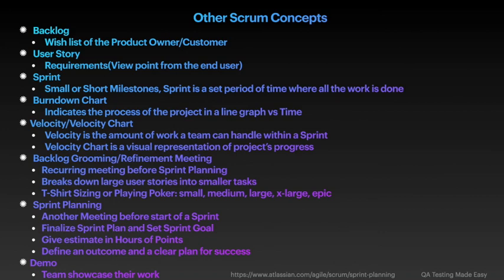The entire team should be in the meeting, including product owner and Scrum Master. Scrum Master is kind of the moderator or organizer of the meeting. The product owner sets priorities from the backlog for the sprint. It is a good idea to groom the backlog items for few sprints, but sometimes for time constraints, that's not possible. Developers, architects, QAs can ask questions if they need any clarification. Most of the questions are asked by devs since they are going to work on it and have technical knowledge. Product owner clarifies any questions or concern the team might have.